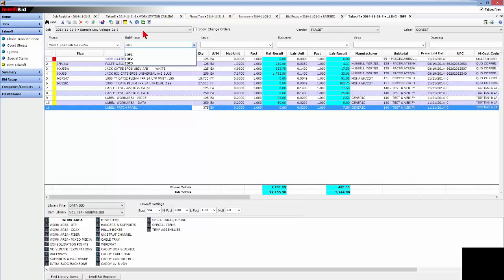So much more different conditions for each one of the areas. This is a baseline for the installation. Conest has NECA standards for normal, difficult, and very difficult. We've got a competitive column here for commercial standards, but every job is a little different. These are the overall job conditions.